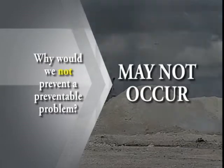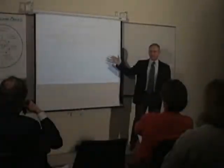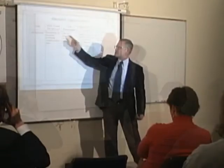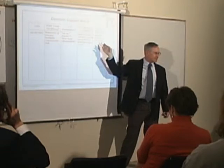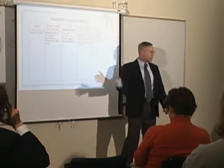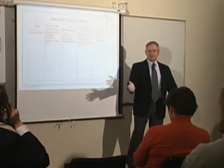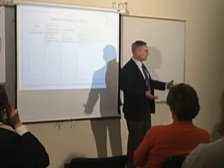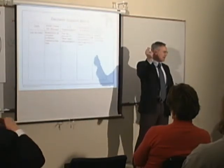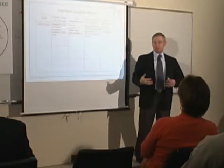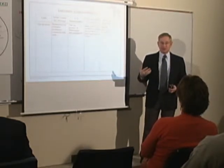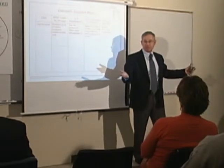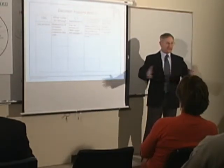Some of this could be a simple verbal dialogue — like a football coach with X's and O's: when you see this, that means something's going wrong, here's what you're going to do. That works for most things. But for immediate action scenarios — a worker falls from a height, a downed power line, a heart attack, a gas line break — we need to respond immediately, so we may need a rehearsal. It could be a reduced-distance slow walk-through, or for true emergency actions, a real-time, real-distance, full-force rehearsal.